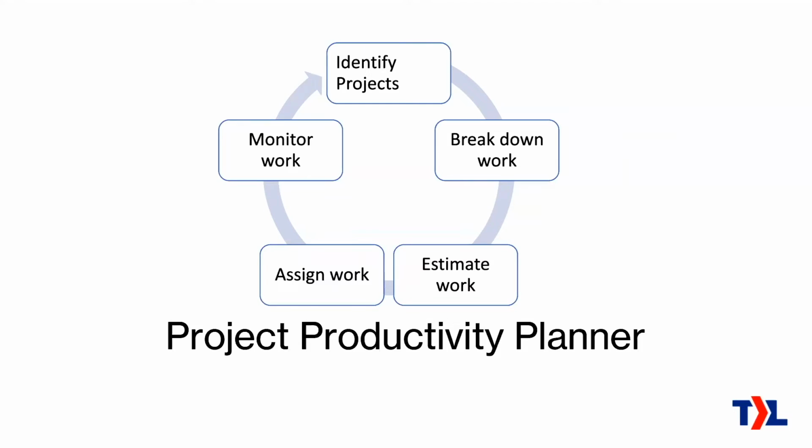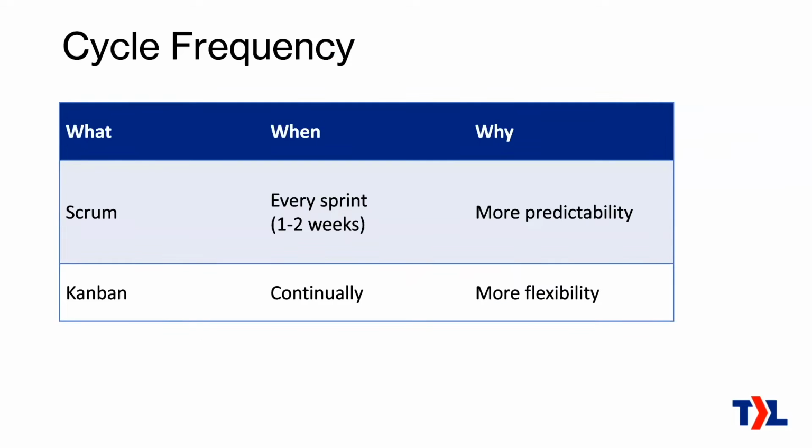First of all, how long is a cycle? There's a methodology called Scrum, which is similar to Kanban in a lot of respects. They're both considered agile methodologies. Scrum is quite prescriptive. If you did want to do Scrum, you would probably want to read more about that, because it calls for certain meetings, for example. Probably the most distinctive thing about Scrum is that it defines cycles called sprints. Usually, it's 1 or 2 weeks. Those are the most common choices.